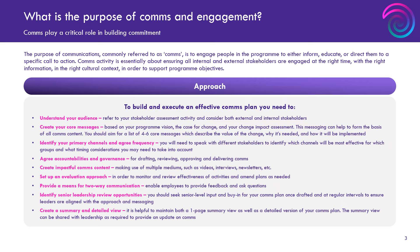It's also good to spend some time thinking about accountability and governance. Communications tend to be one of those things that get held up with senior stakeholders wanting to review and change words, and everyone wants to have a go at the draft. Really agree that governance up front. Don't let that become a delay because ten people want to read every email that goes out. Agree who gets to sign off, agree what type of communications key senior leaders need to see, and try to limit the governance so that you can drive accountability and ownership through the communications team and get going on sending your comms out.